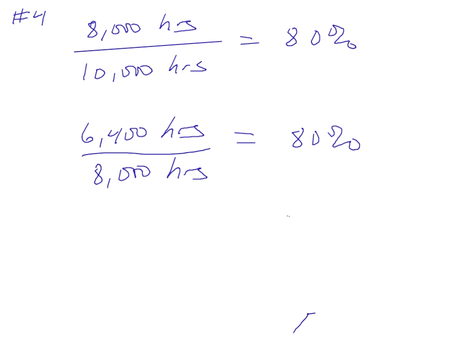Every time you double the amount of units, you also reduce the time, and the time to make that next unit is 80% of the prior level. So let's see how to get to the 8th unit and the 16th unit.